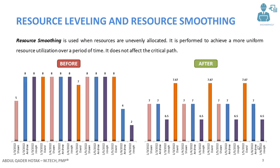Resource smoothing is used when resources are unevenly allocated. It is performed to achieve a more uniform resource utilization over a period of time. It does not affect the critical path.